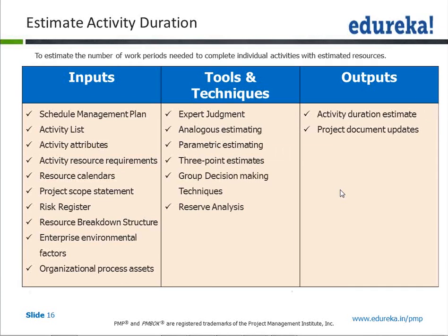So then you use that 10% and give a lesser time. Or if you feel that this project is a bit more complex than what you had done earlier, so you need 25% more time, then instead of 1 man year you will put 25% more. Okay, so that is one way.